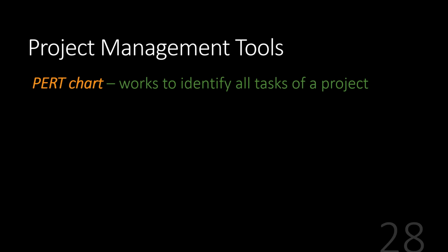But the idea here is the project management tools let you lay out all the required tasks, who you have assigned to them, what the deliverable of that task is going to be, and your scheduled start, stop dates, how much effort is going to be required, and the effort would be presented all the way down to how many hours of work it will require. So the project management tools allow you to set that all up, as well as which tasks require other tasks to be completed first versus which tasks can be performed at any time at all.